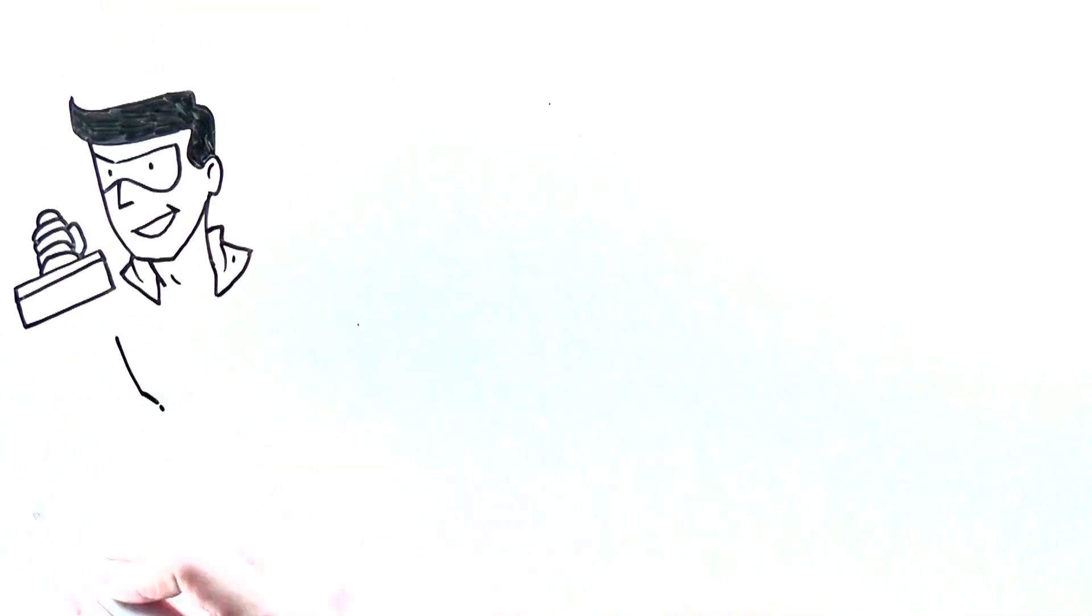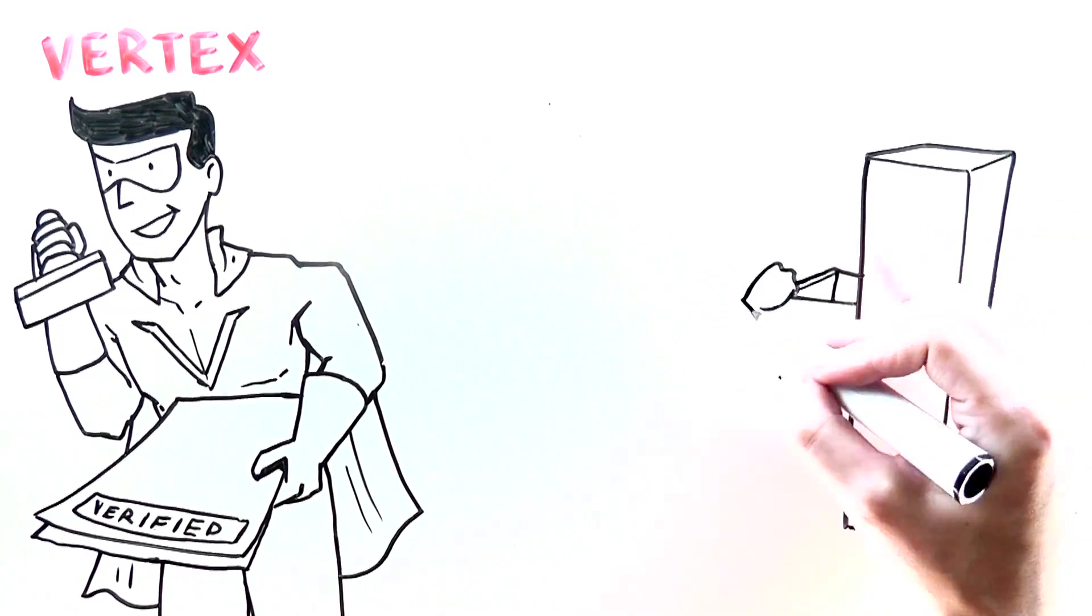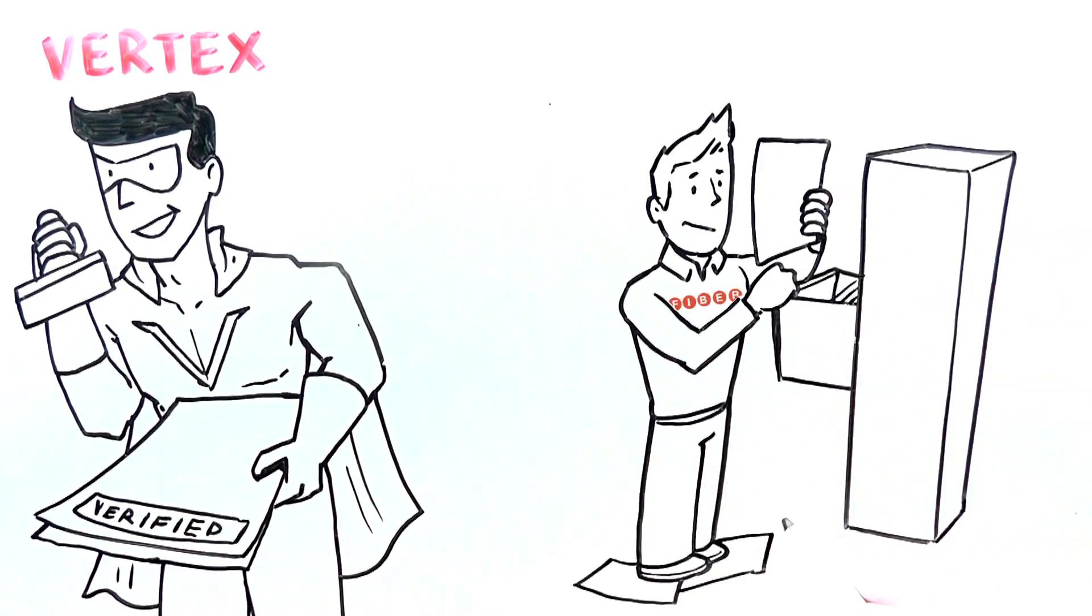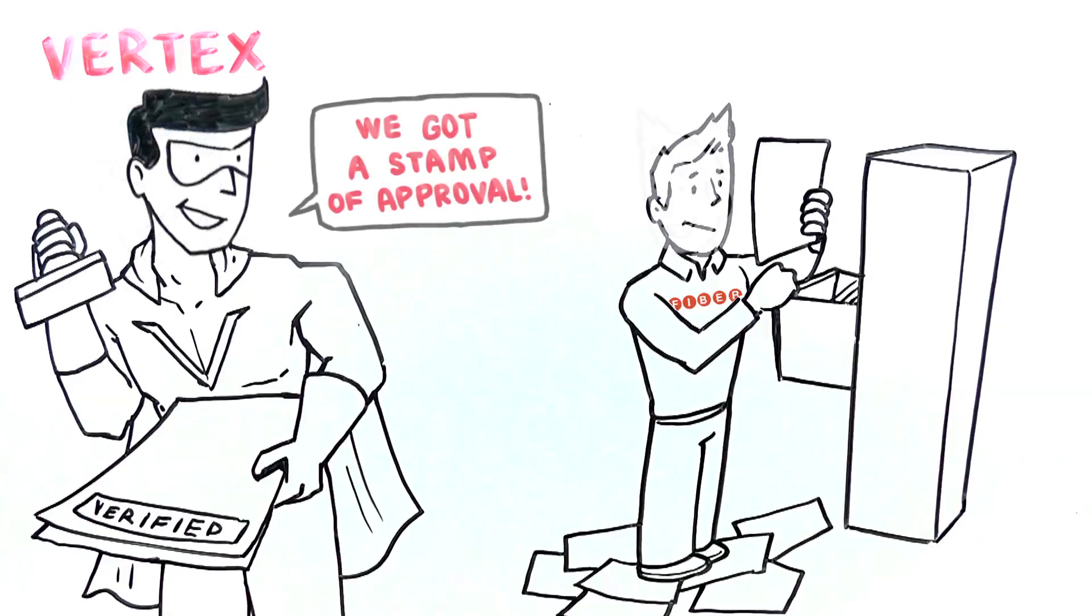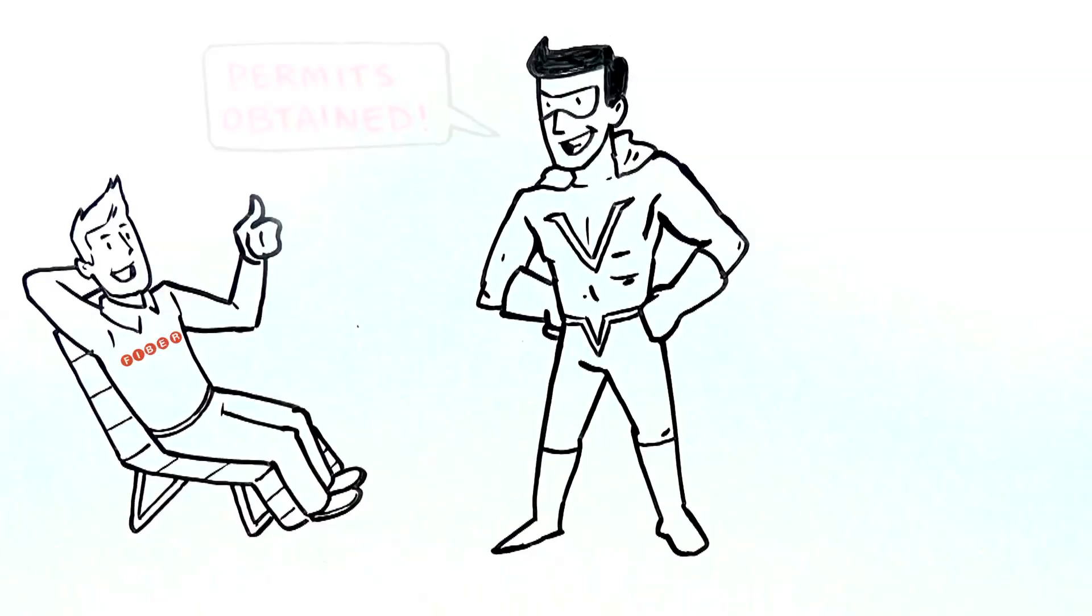Before construction can begin, all permits are verified and approved. This process is painful when not managed by Vertex. Local permit offices do not have the capacity to deliver efficient nor accurate documentation. Vertex will confirm that all permits are obtained without any hassle to the fiber provider.